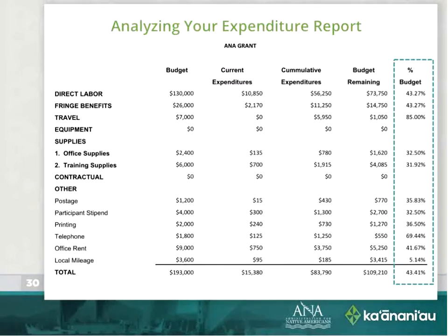Okay. Well, now I'm going to look at percentage of my budget that's been spent. And a lot of you get this in your financial reports too. Well, I'm 50% through on time, but I've spent an overall 43.41% of my budget. Now, if I was on a full cash basis, I might say, well, that's right within the 7 to 8% variance. I'm spending right as planned. But not so. Not so.